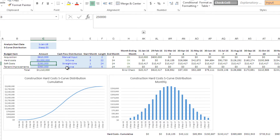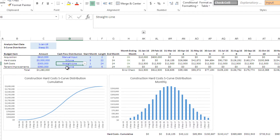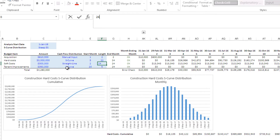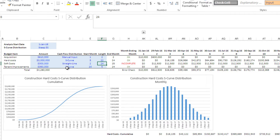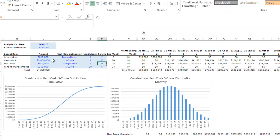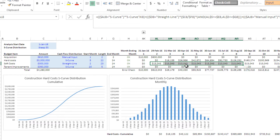Soft costs: I'm going to set this to $300,000, straight line over 24 periods. I'm actually going to start this in month 2 for 23 months — it should end in month 24. If I have too many months, this will say incomplete because there are cash flows left over happening in month 25, and there is no month 25 in our analysis period. So this needs to be 23 months. That gives us our OK — budget amount divided by the length, evenly distributed in each period.